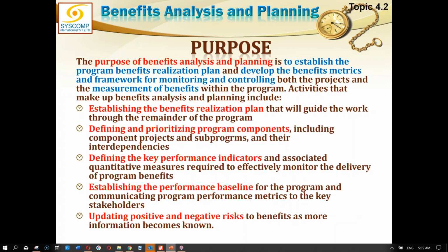In the third edition, they used to have a separate benefit realization plan. Now they don't really call it a benefit realization plan. They consider the realization plan as an artifact of the benefit management plan. So the main term here is the benefit management plan, and the realization plan and other artifacts are part of that.